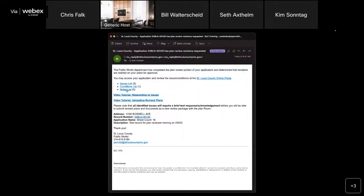This time, we've got links again to take us back to that same issues list. You're also going to notice that we have an issues list, a conditions list, and a notes list. I'll talk about this once we flip back over to the portal. We have a tutorial on responding to issues, as well as a tutorial on how to upload those revised documents. Down here in bold, we just want to bring your attention to the fact that all 5 of these issues listed out here as part of this plan review must have a narrative response provided before we can fully resubmit your review package.